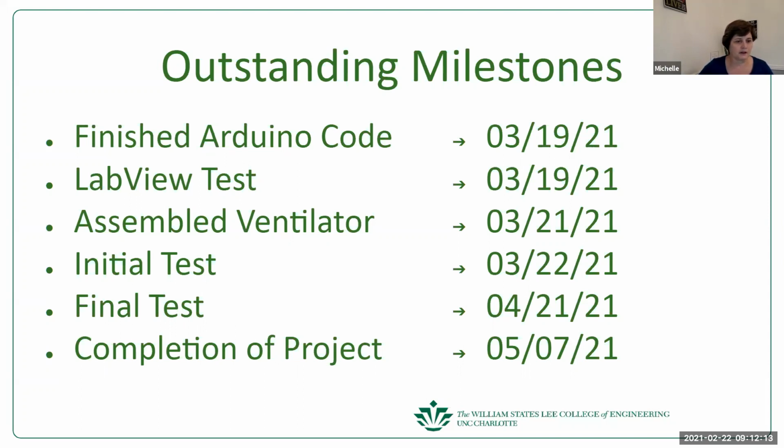Is there anything that can be done to assemble the ventilator mechanics before the 3rd week of March? Yeah, I'm planning on maybe me and Taylor next week getting together and starting to put together what we can. Okay. That'd be good, because if there is something that you didn't realize you needed, you still have time to order and get it. And you've got the budget left to do it, which I think is great. I think you're setting yourself up for success because you've got time if you have to change something to get new parts in, and you've got budget to do it.